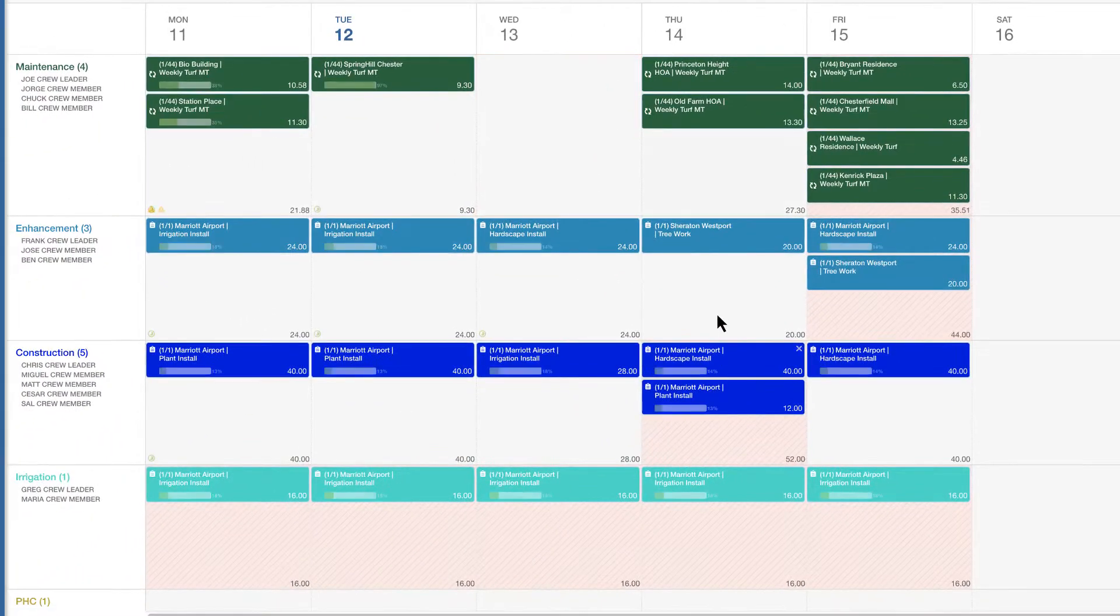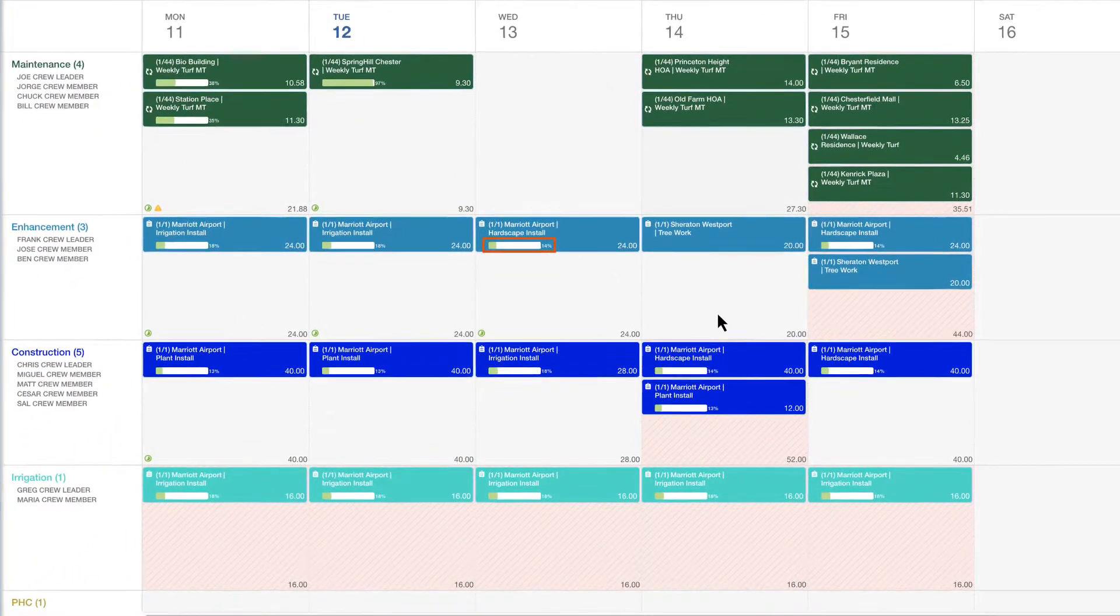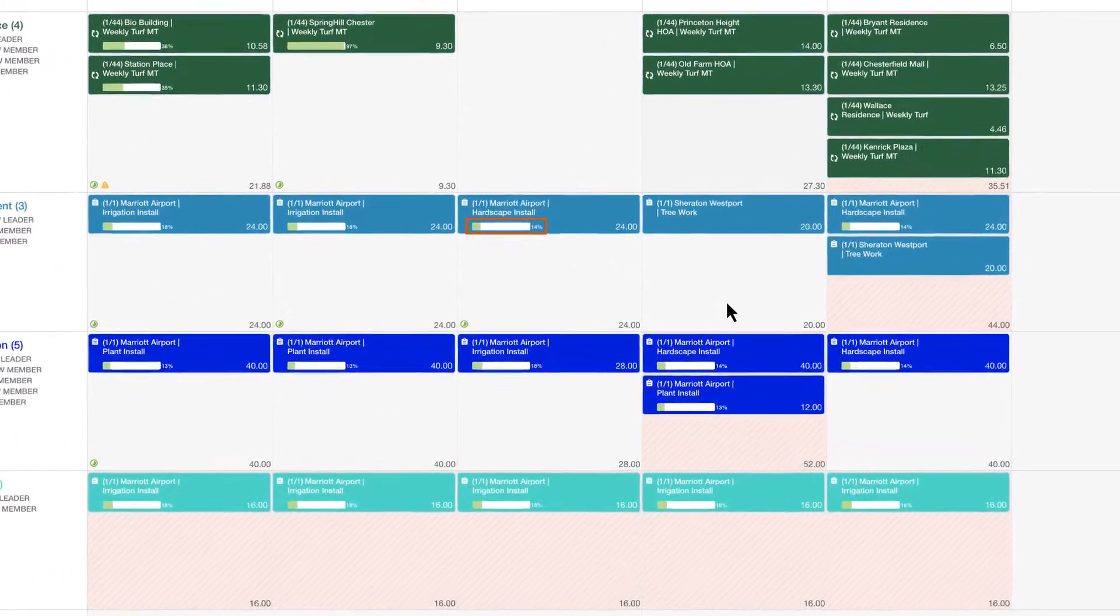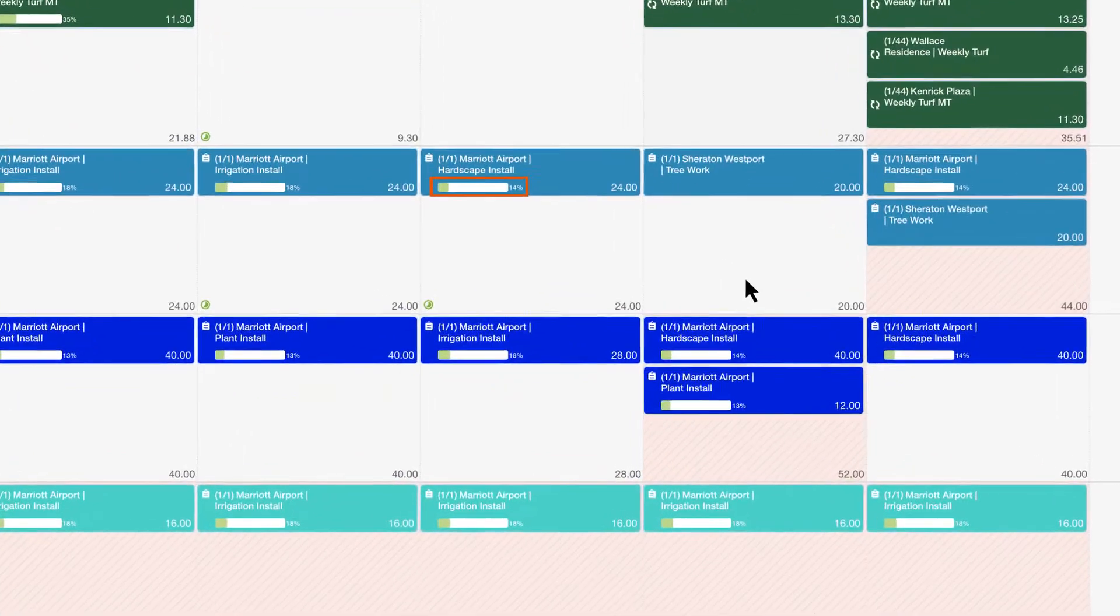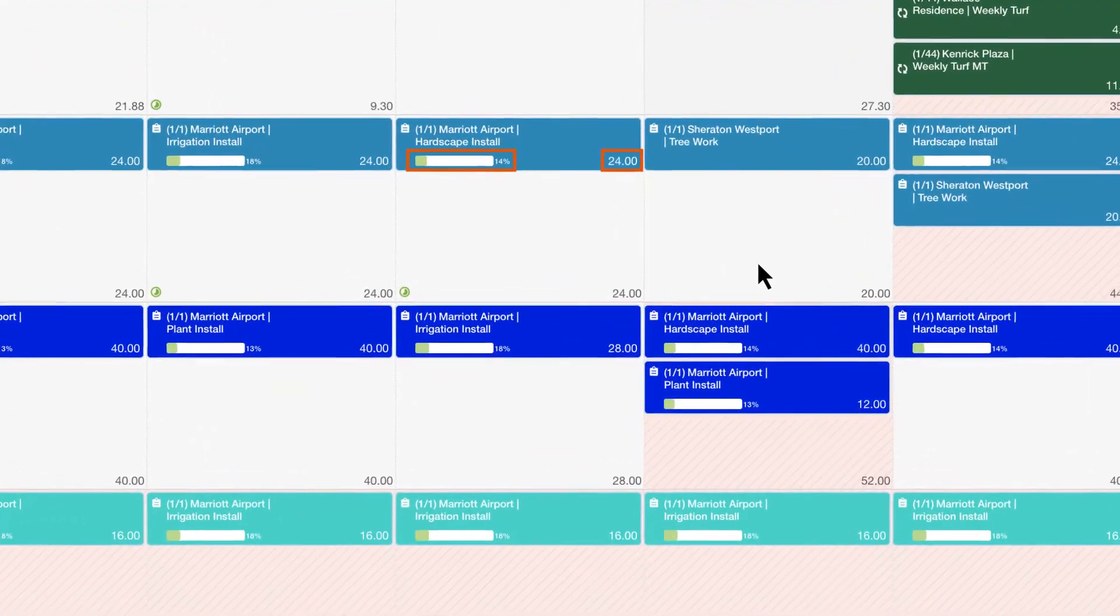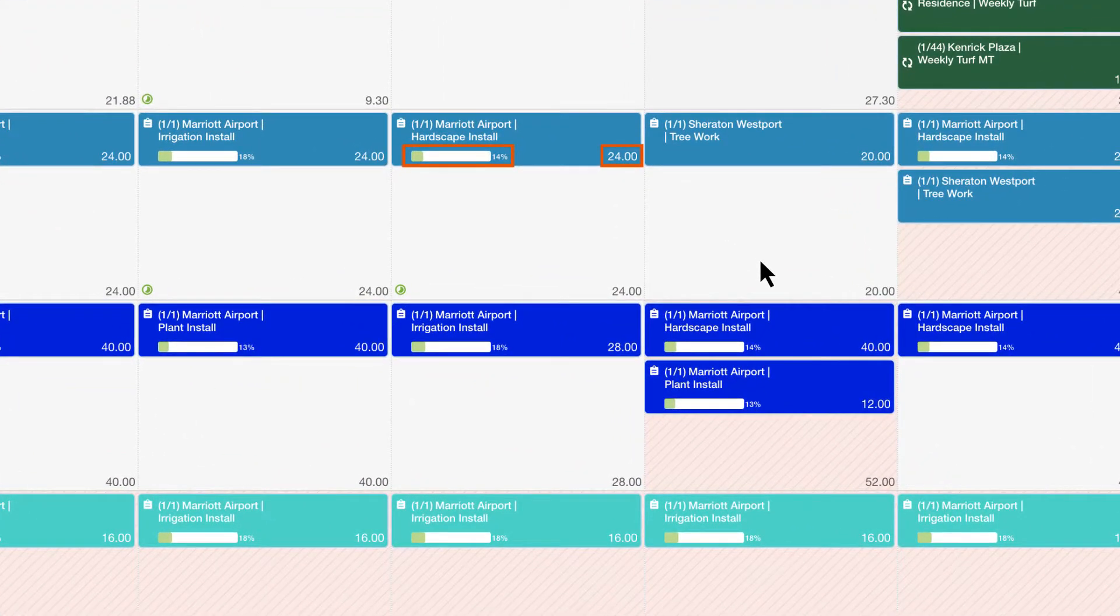Notice jobs display a progress bar on the schedule to show the percentage of actual time worked in relation to the estimated hours after time is approved each day.